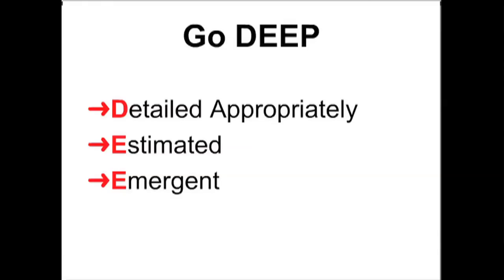And then the last, the P, is prioritize, which we've discussed quite a bit. Do you have any parting shots on prioritization? No, it's just we also try to do prioritization during the grooming session, or grooming the backlog, which is prior to our every 2-week planning session. So what we do is we go through it again, do other estimates, create new ones, and try to do prioritization to get it prepared and ready for the upcoming planning session.